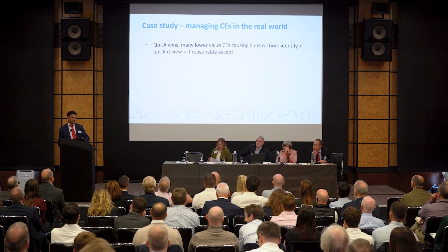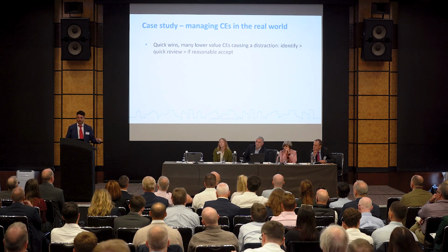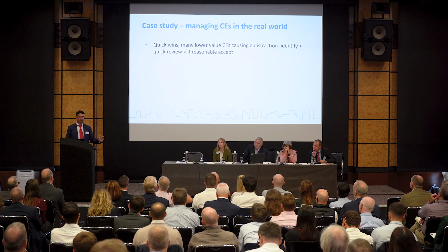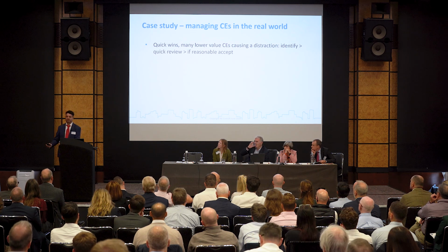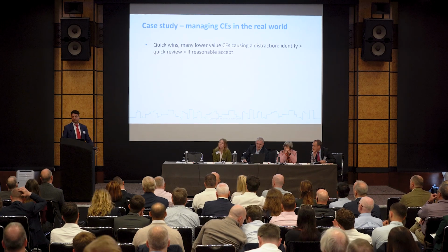So firstly, quick wins. Clear out the detritus. It's a distraction. The small value stuff, get rid of it. Have a quick look at it. Is it there or thereabouts? Accept it. Get rid of it, because it's a distraction. You'll spend more time arguing over 20 little things than the one big thing that's the elephant in the room. So look for the quick wins, identify them, quick review, try and get them accepted to clear the trash out of the way.